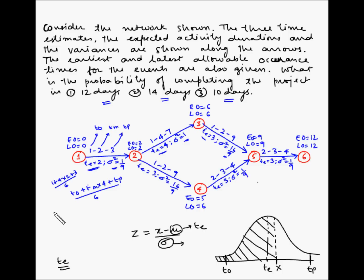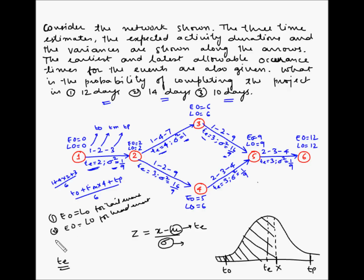One method uses three conditions: if all are satisfied, the activity is critical. Condition 1: EO equals LO for the tail event. Condition 2: EO equals LO for the head event. Condition 3: EJ minus EI should equal LJ minus LI, which should equal the expected duration Te of the activity. Let's use these conditions to identify each critical activity.